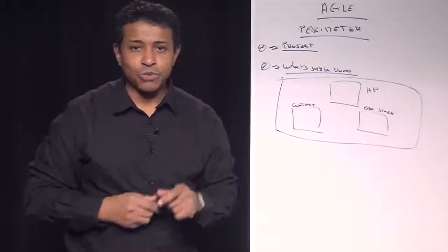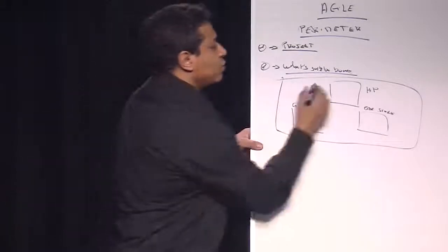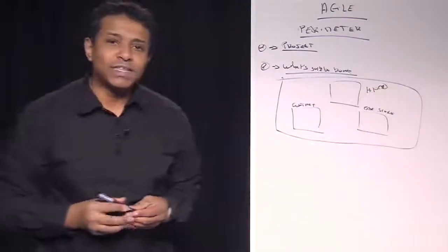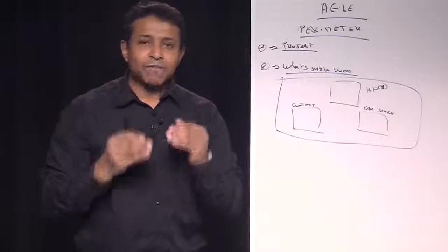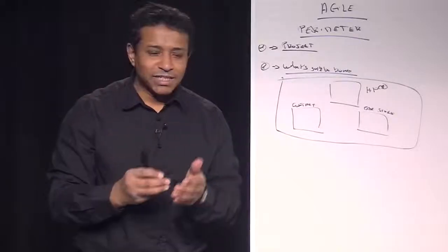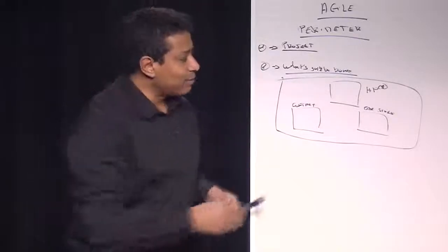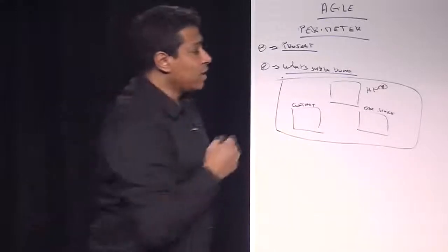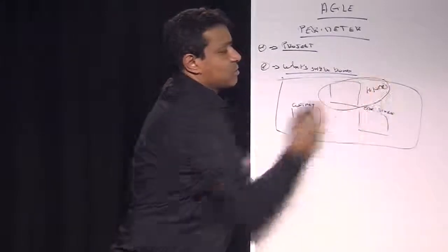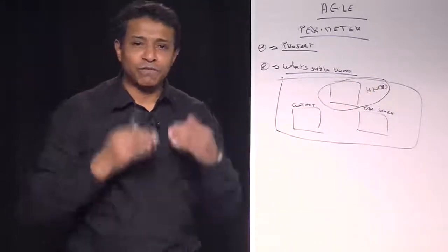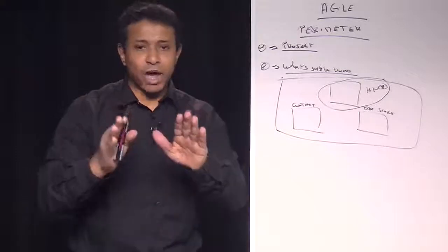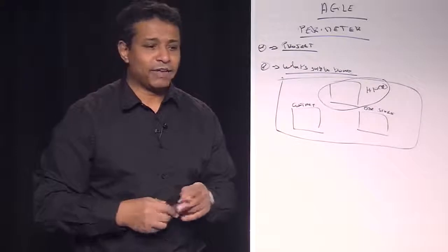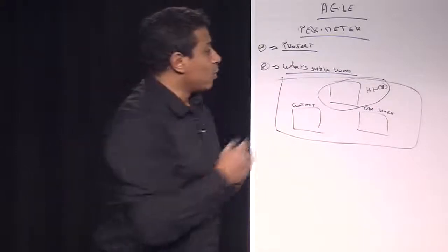So what I'm asking you, technical, is to do this first as a priority. Why so? Because if my site needs to be delivered on the 31st, and it happens that I cannot finish these 2 pages, I will have these landing pages that I will be able to put in front of the users to say, hey, wait, it's going to happen. It's going to happen, but in a few days or so. So what's going to be done?